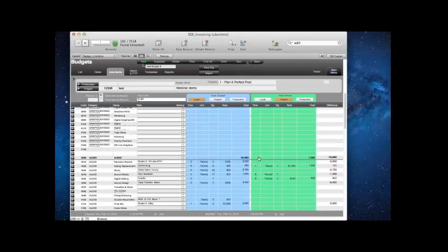Down in the 4,000 range. There we go. So I just added a number of different things in the 4,000 range, and we're looking at the local numbers on this budget that I've typed in and printed out and given to the client. And then under the actual, because we clicked the project button, this is showing a summary of all of the project line items that have a corresponding budget code. So, and it's showing me the difference. So my actual stuff is showing up, calculating to be a lot less than what I budgeted.